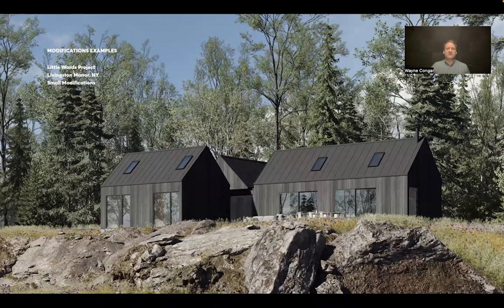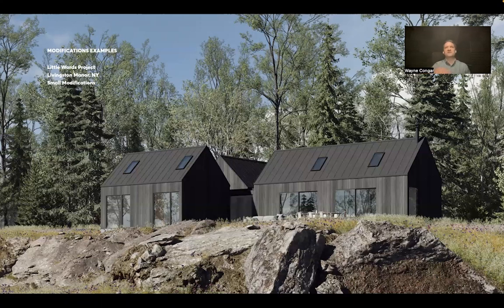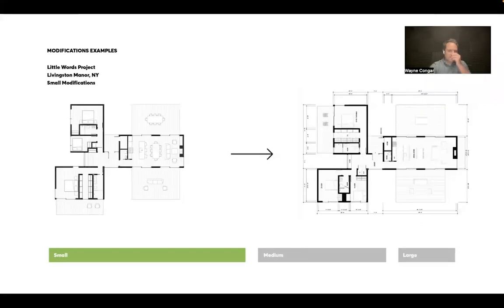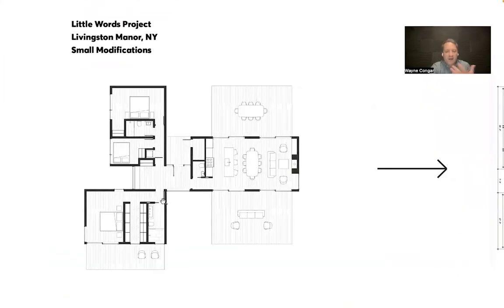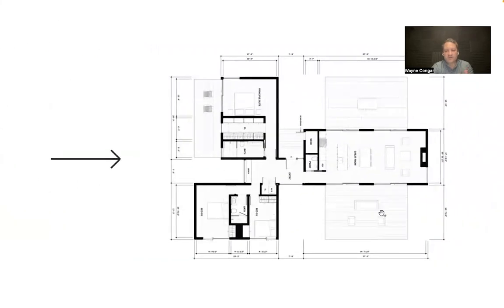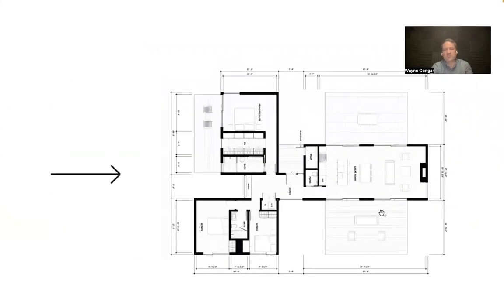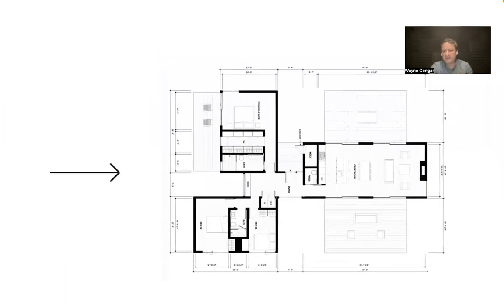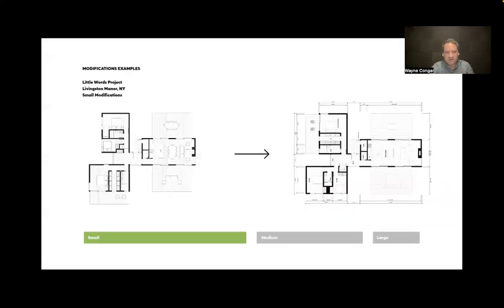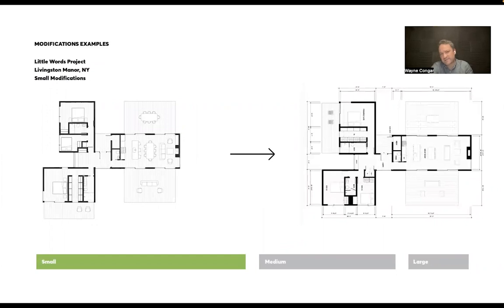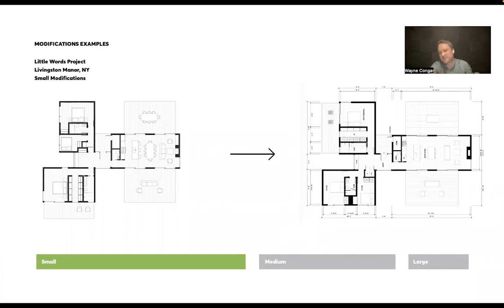And so here, this is a project in Livingston Manor, where we produce a series of small modifications. And this lot is sort of steep up and going up to a high promontory that has a forest in the rear that's really beautiful, and then sort of a ridgeline view in the front. And so you can see here that the types of edits that we've made from on the left, which is our sort of out-of-the-box floor plan for our standard, to what we've done here on the right, which is the final plan for this home, are quite light, that the spatial arrangement is the same. We've made a couple of revisions to windows. There's a little bit of interior wall pushing and pulling, but the plumbing has stayed the same. The structural arrangement has stayed the same. Kitchen setup has stayed the same. We've made some changes to closets, to locations of bedroom spaces, but they're interior changes. And so all of this was very much within our scope.